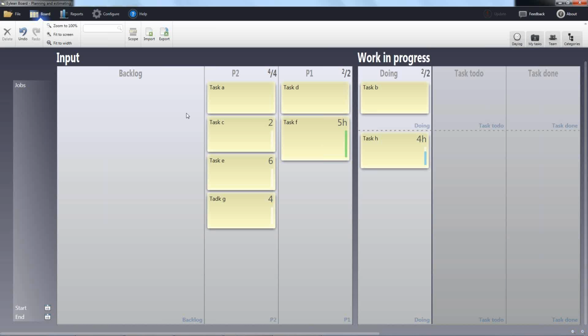I won't be bothered by support, because I won't need to estimate support. And what is support estimation in the end? We cannot estimate how much time we will spend talking to customers and how much time we will need to resolve their problems. We might say it's not more than a day, but it might take 1 hour, 15 minutes, or 5 hours. That's a huge deviation. With story points, you estimate only the tasks that matter the most, the new features, the new products, or whatever brings value for your company. Then, when you have your own speed, you have the understanding, and you can proceed to improve that speed.